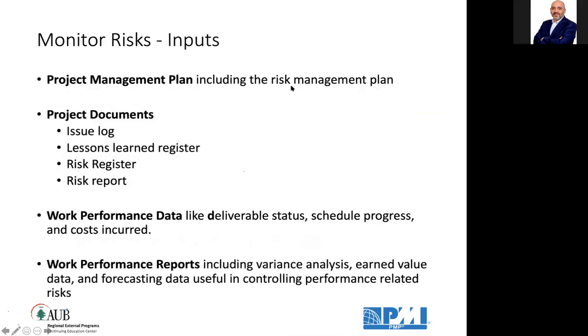I need the risk management plan, the risk register mainly. I need deliverable status, progress on schedule, actual costs incurred to track and monitor risks. I need work performance reports like my variance analysis, my earned value data, my forecasting data, any useful metric in controlling performance that are probably cost or delays or other things.